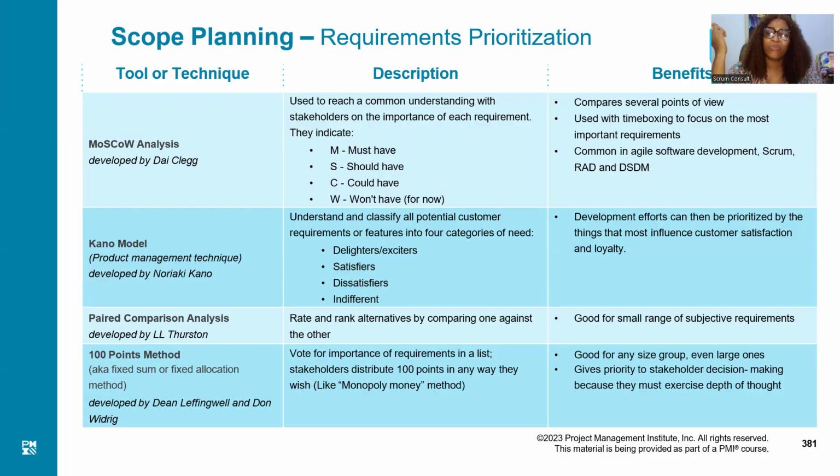So that feature is very important. They are your delighters, they are your exciters. Without those features, the customer will not be happy. There are ones that just merely satisfy, okay? It's good to come out and have a way to wash your hands. There are ones that, if they are not there, the customer will feel it. The customer goes into a toilet and there's lighting. Of course, he uses the toilet and goes away. But if the customer goes into the toilet and there's no light, the customer becomes very dissatisfied. You need to come up with those features too, right?